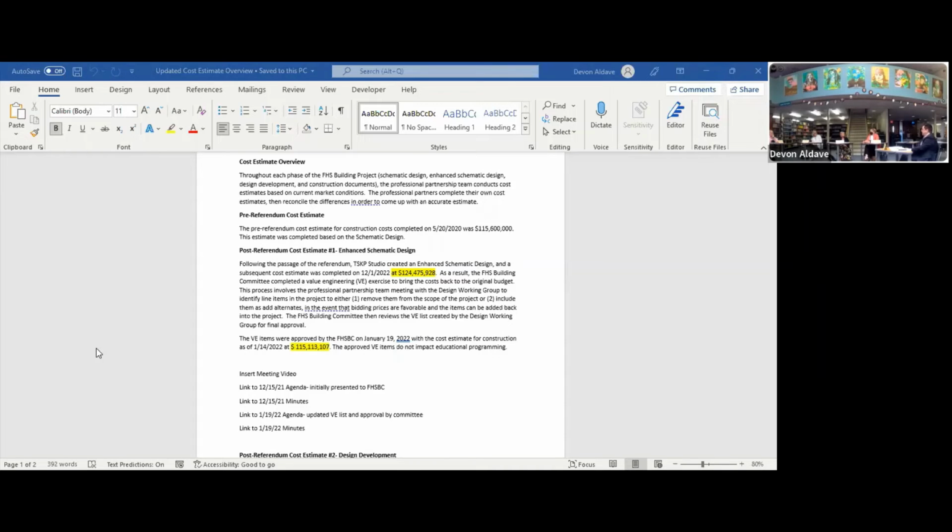Option three would be to get a range of cost estimates for those spaces to renovate, because down the road you might want to put some money into the auditorium or convert it to storage space or a meeting space. So we wanted to see that true cost and do some capital planning, so we have a bigger picture. And because you're retaining more buildings, there would be a potential to see if a ball field would fit where the existing town hall is. So the potential to get a cost estimate for demolition of town hall and construction of a ball field. So really looking at all the options and then going back to town council.